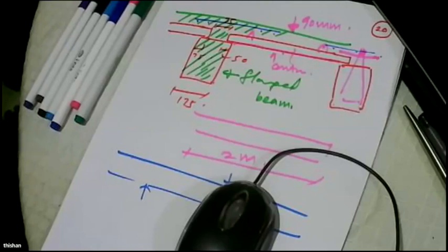Okay, sir. Is there any significant cost saving compared to reinforced bars and the normal beams? There's one question like that. Yes. Actually, you can complete this slab for about 8,000 rupees per square meter, whereas the conventional can go up to 14,000 or 15,000, because this is very cheap when the spans are large. This is a very cost effective system because you don't have to spend for shuttering. The reinforcement is less, and reinforcement is very expensive, so whatever reinforcement you save is a huge saving.